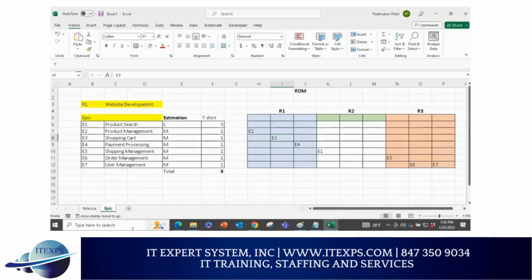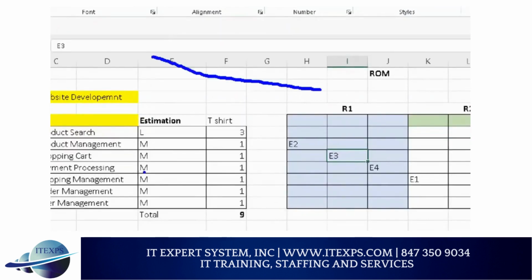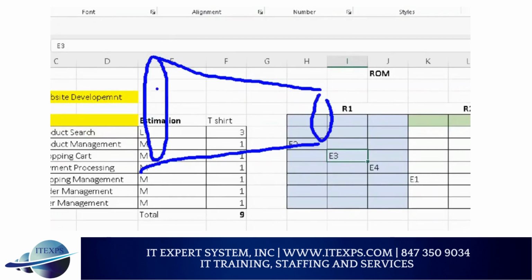And wherever you were saying small, we did medium. So you can do approximation. Nobody will ask you why you are wrong. This gives me a ballpark. It is not a detailed estimate. But at a later time, when we have more details or more exact information, that will go to a later estimate. So it's a refinement. Remember last week we talked about the cone of uncertainty. How many of you remember? Did anyone watch the recording? Cone of uncertainty: when you start, you will be wrong. Do you agree or not? But you still do the estimate. And then as you go further, your estimate will be refined. But you are not there yet. I need to know approximately how long it will take.